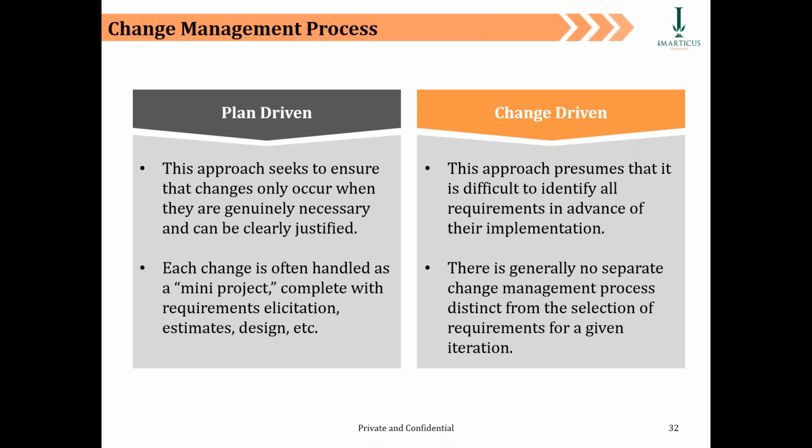So if you see, guys, in plan driven, each change is often handled as a small mini project. Typically in waterfall or plan driven approaches, the changes which come in are rather large, and hence the change process is very successful in plan driven approaches. And honestly, in change driven there is generally no separate change management process distinct from the selection of requirements for a given iteration.